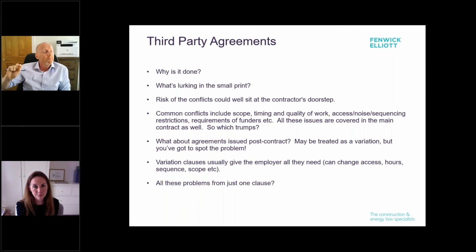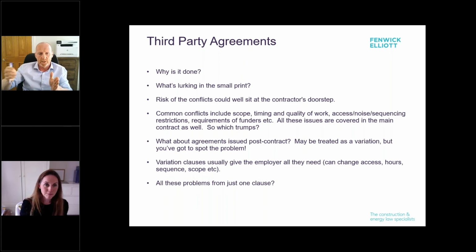Building contracts don't contain that, but as a contractor, I have a date to finish by, and that can get extended in certain circumstances. And if it's not, then I pay you liquidated damages. How do those two obligations sit? What happens if I'm entitled to a full extension of time, but I'm still beyond the long stop date in that other agreement? Don't know the answer to that.